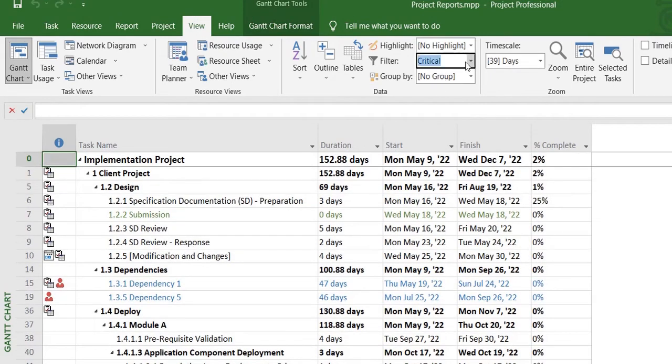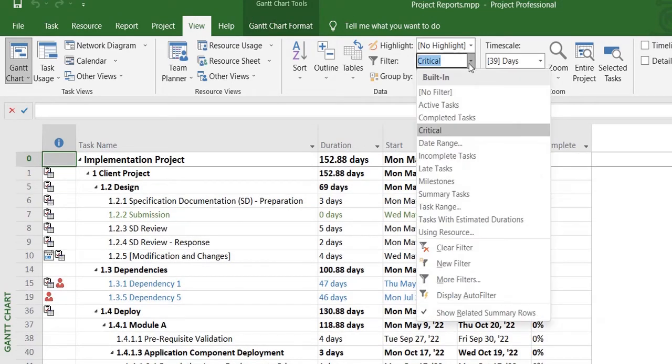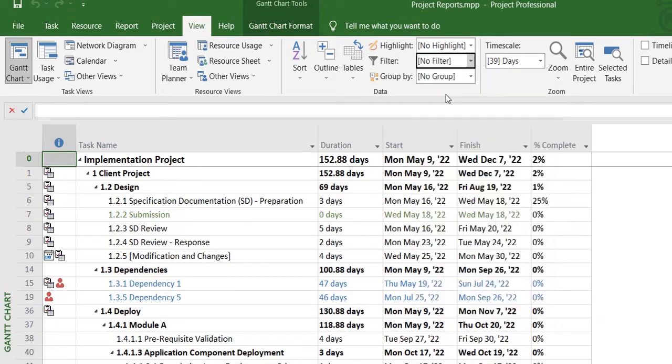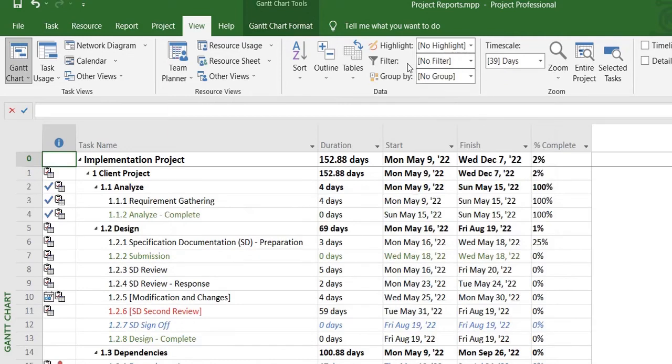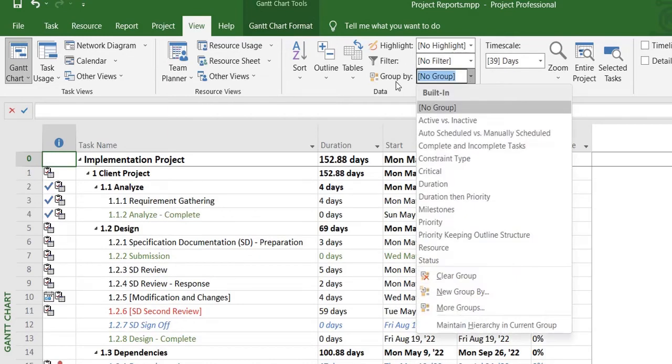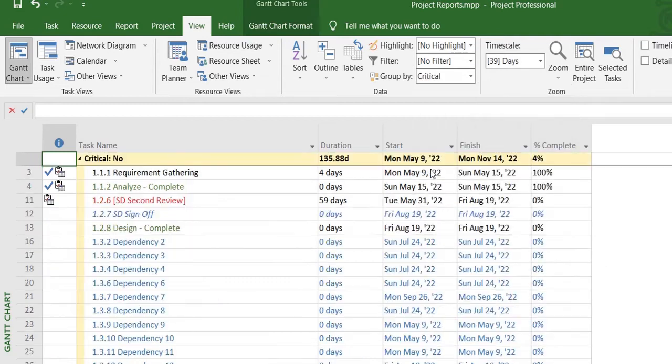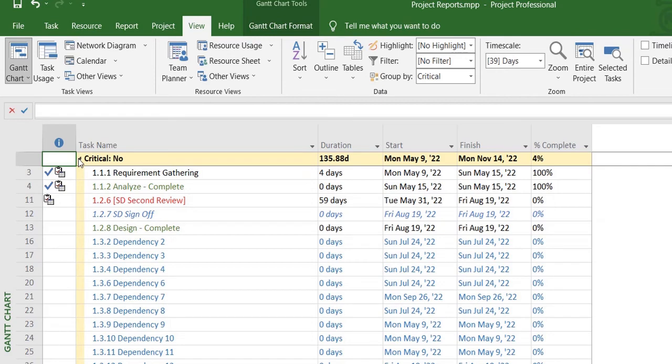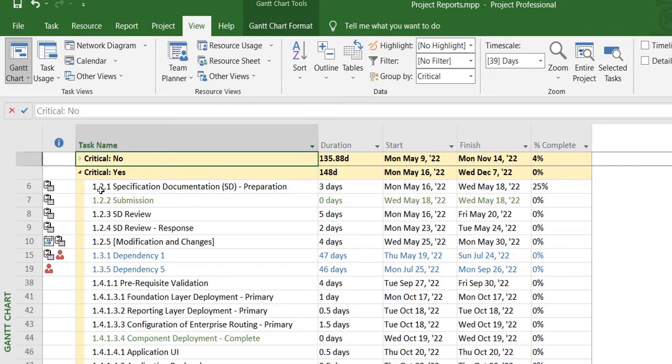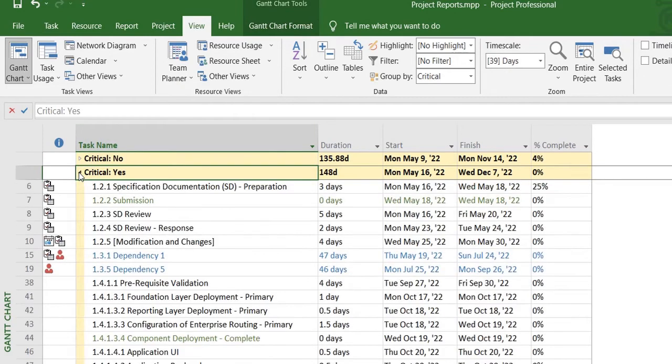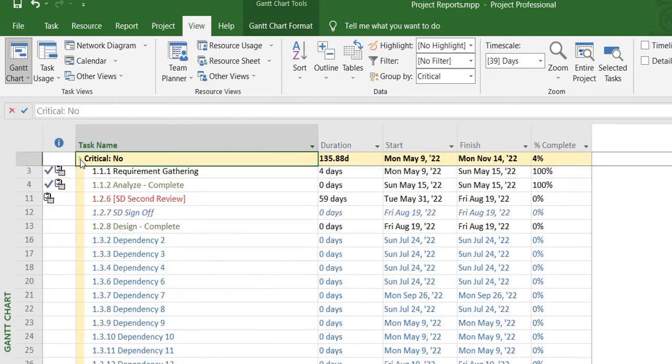Then you can also group your tasks based on their criticality. So you select the Group By clause and select Critical. It will firstly show you non-critical tasks—these are all the non-critical tasks within the project—and then you have all the critical tasks in your entire project plan. So it basically segregates your entire project plan into critical and non-critical tasks.